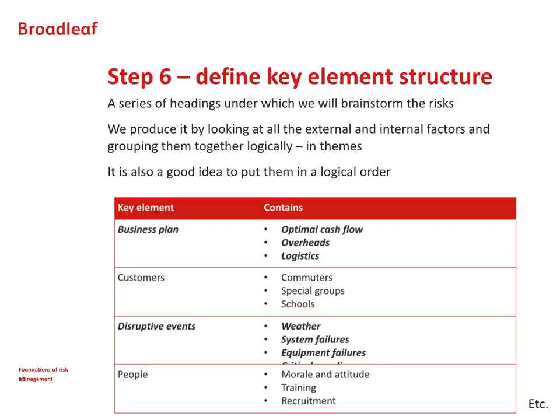Typically, we would take about 30 minutes for each key element to discuss and understand the risks associated with that theme or that concept. And you'll see here, therefore, we have a 4 key element system, which implies that this sort of discussion would typically take about 2 hours.